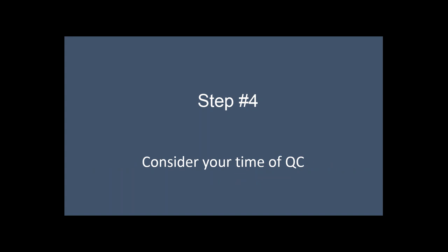Just create a checklist and you will check. You have asked your customers, you have told your customer that, okay, I will give you a logo, I will give you text design, I will give you these images, I will create a page and that will be integrated with Facebook. All that stuff, make a checklist. That deliverable document will work as a quality control document for you as well. So you have to do quality control before passing the work to your customers.